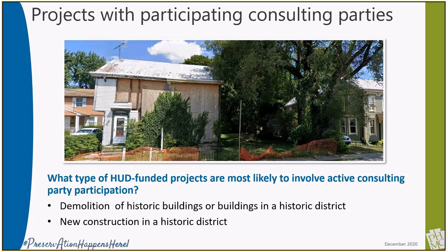For the demolition and new construction projects shown here, the grant recipient acted as the federal agency coordinating the consulting party process. Conference calls were held to discuss the project, weigh alternatives, and agree on appropriate mitigation. While there were no objections to the demolition given the fire damaged condition of the buildings and their location at the very edge of the historic district, the local historical society and the local historic architectural review board for the borough of Carlisle's historic district were involved in the consultation process.